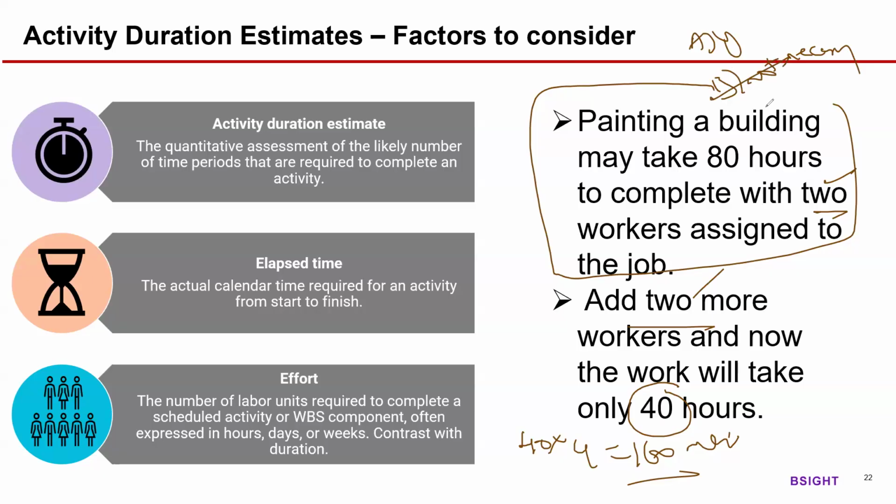In some cases, yes, possible, like building, painting. Some of them can paint inside the building. Some others can do from outside the building. So you have a lot of work area, they can do it. But not in all the activities. Sometimes you have to work in restricted zones, work fronts will be less, etc. If 10 people can finish the activity in 20 days, 15 people may finish in, let's say, 17 days. 25 people may never do it. You have to know that.